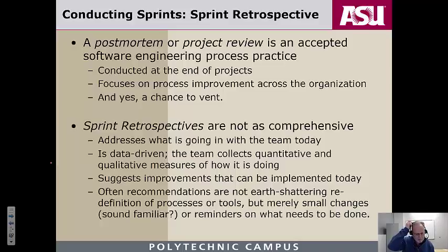The sprint retrospectives in context of Scrum are not as comprehensive. They're not as broad in scope as a full project review. Even though at the end of a release in Scrum, a formal release externally to customers, not a shippable increment, excuse me, you can still do a full-blown postmortem. But at the end of a sprint, as it was a short time period, the development team, the pigs and the customer, will conduct a sprint retrospective.